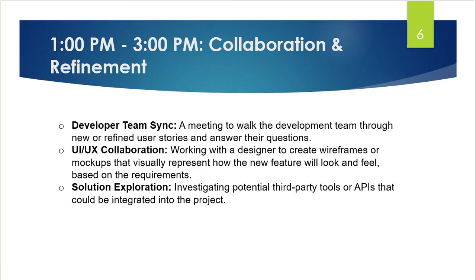In that time I'll walk the development team through new refined user stories and answer their questions, explain what I've created in the user stories if needed, the definition of done or definition of ready, and the user acceptance criteria: how we can say that user story is successfully implemented and done, what things the system needs to perform. So I'll discuss all these things with the development team and take their feedback, you can say.